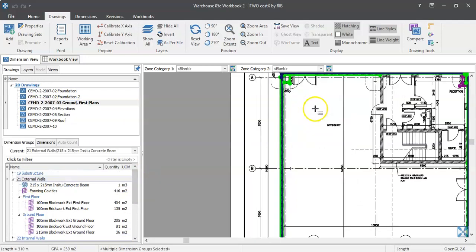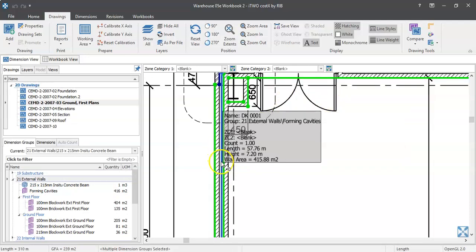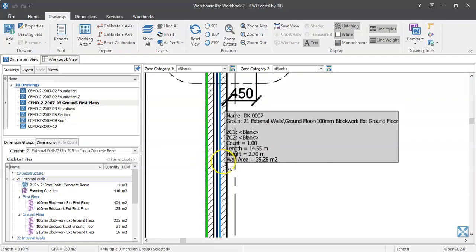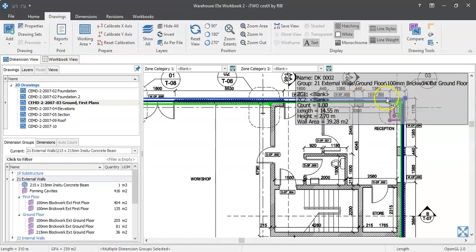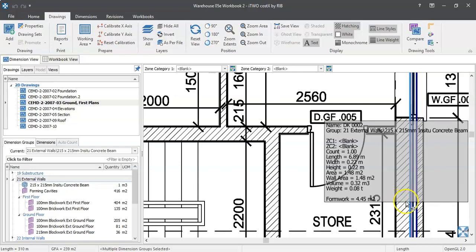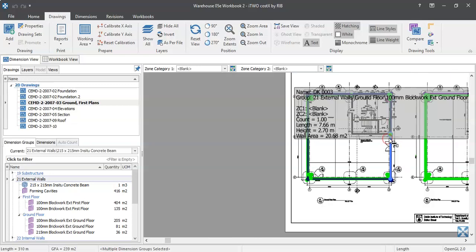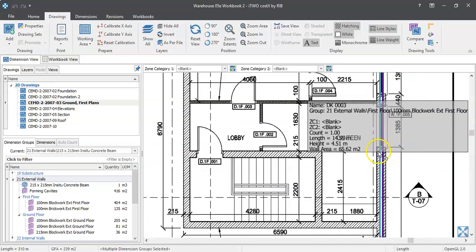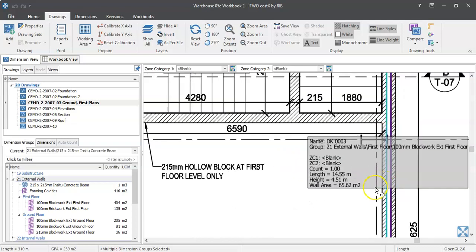Let's have a look at the exterior walls. Okay, so what we got going on here, we've got around certain perimeter, certain elevations, we've got 2 blockwork walls, the outer leaf and the inner leaf, and they're both 100. But around here, around this corner, so this elevation and this elevation, we've got a brickwork outer facade and a blockwork 2 and 5 inner. Okay, so just be conscious of that. But that changes again going up here. We've got the brickwork and 100mm, so it's a little bit complicated. What's brickwork, what's blockwork, figuring out what OPEs to deduct.